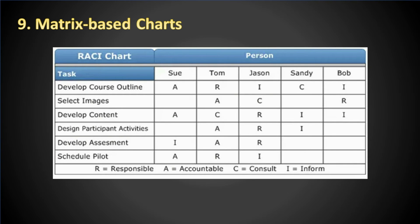A RAM is a matrix-based chart used to illustrate the connections between the work that needs to be done and project team members. A RAM can be developed at varying levels of detail, commonly at the activity or deliverable level. Typically, deliverables or activities are listed in the left-hand column with team member names across the top, aiding communication and helping expose any gaps that may exist.